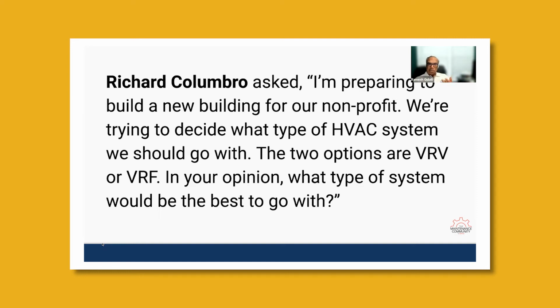How much is it going to cost you to operate? How much is it going to cost you to maintain? And look for 20 years what's going to happen when you have replaced a major component, all these kind of things. So by doing a life cycle cost analysis on this for 15 years or 20 years, then decide which system is more cost effective, and that's what system you should be going with.